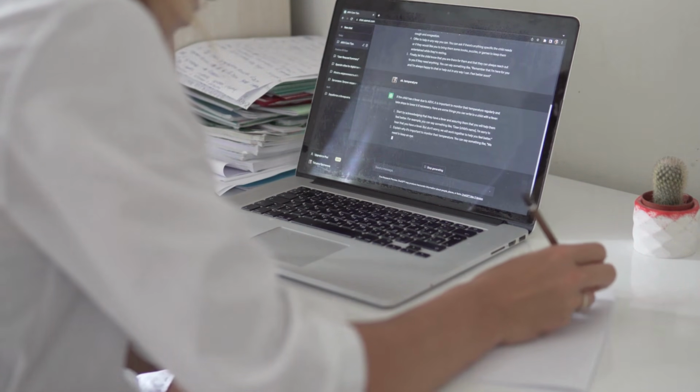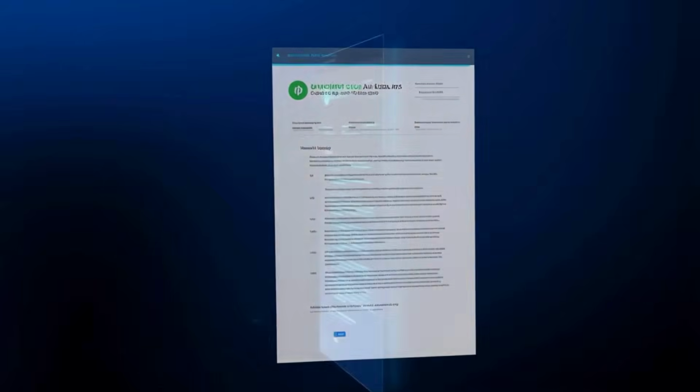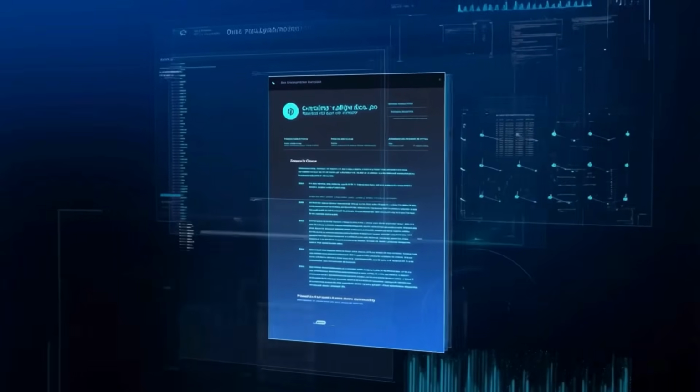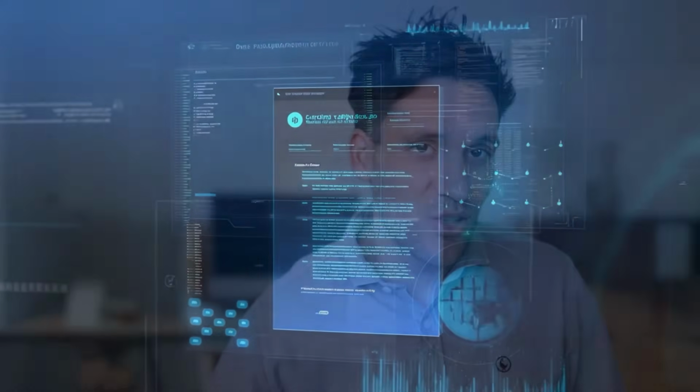So an integrated approach to using AI would be having AI contract reviews integrated into your tendering process. So for every contract, before you sign it, AI extracts key terms, compares them to your standard terms and conditions, flags departures, generates the first draft of your departure register, and identifies any key commercial risks you need to budget for in your estimate. A human then reviews the output, and it's not an optional step, it's a fundamental part of your process. It's integrated into the process.